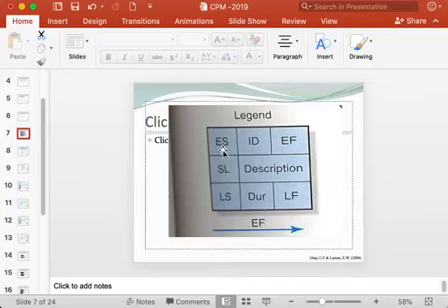This shows when this activity can start at the earliest, and the earliest finish time represents by when this particular activity can finish at the earliest. Similarly, the latest start time indicates latest by when this particular activity can start, and latest by when this activity can finish.